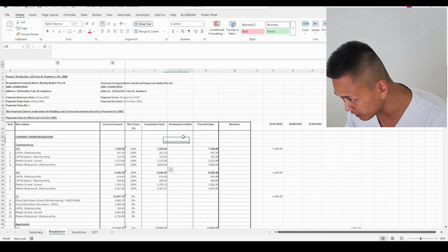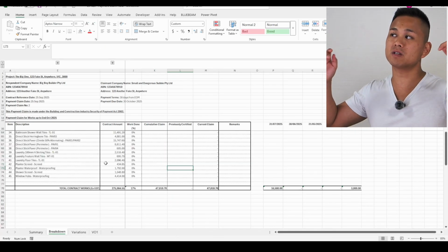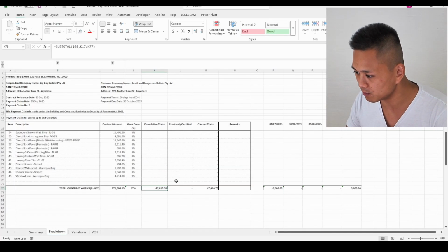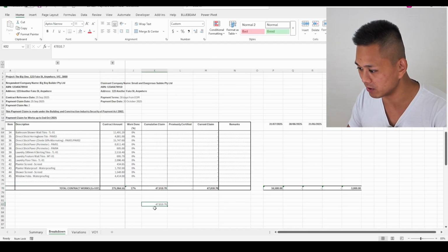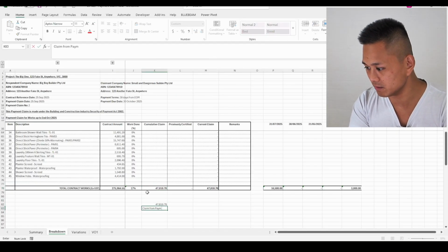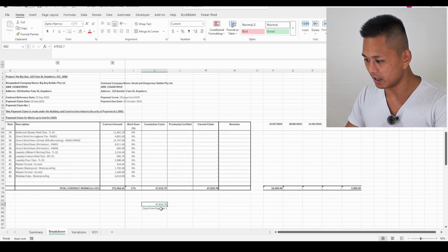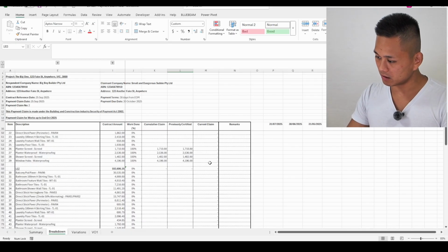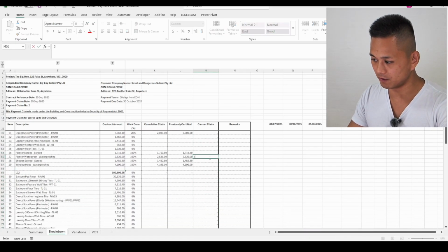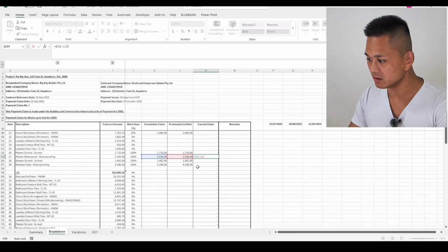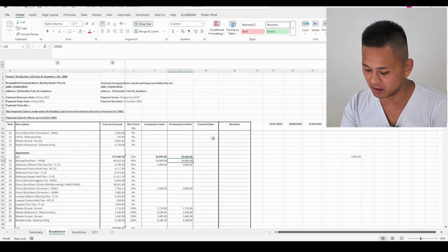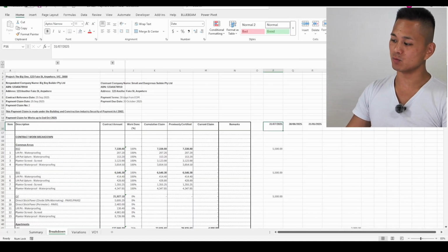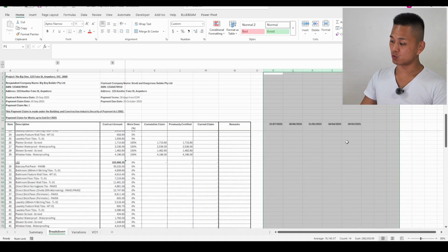So let's just populate this previously certified column, which assumes the builder has short paid you some amount, all right? Then the amount is arbitrary. So what we'll do first is we'll just take whatever we claim from payment 1. So this is the claim from payment 1, okay? So that's the amount before retention. And we're just going to now populate this. Okay, so now our current month's claim is 0, and that's just a formula for K minus L, these two columns. And then we will say the builder short paid this value, and the builder didn't want to pay this value. The way we're going to manage the bookkeeping is we've got these hidden columns here just to track